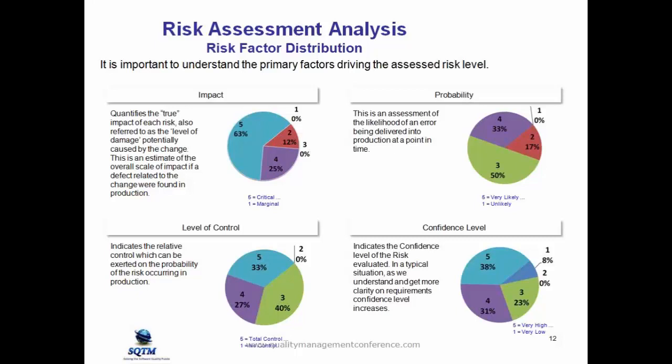So your risk rating for this particular requirement, let's say if we were just using the 5s and we counted up to 5, so let's say a 20. When you did this the first time, your risk rating might be 20, meaning 5, 5, 5, 5, the highest risk possible for this requirement.